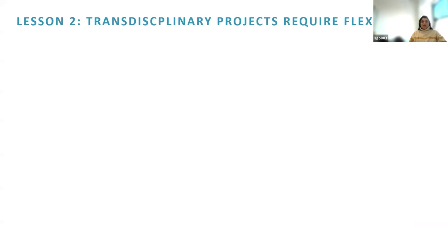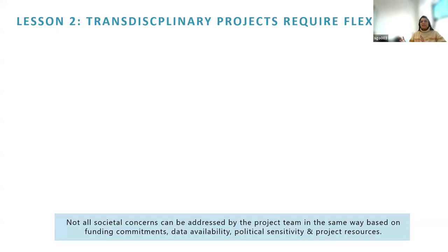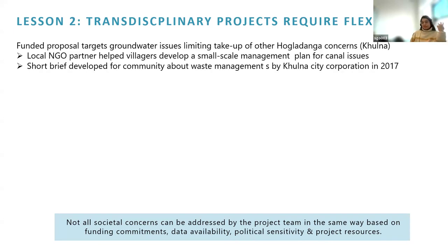The second lesson that I want to highlight here, based on my experience with transdisciplinary projects, is that it does require a lot of flexibility among the project team. Not all societal concerns can be addressed by the project team in the same way because of funding commitments or what our funders require us to focus on, but also data availability, political sensitivity, and project resources. For example, like I mentioned, there were three issues that were identified, but our proposal that we got funding for was focused on groundwater issues. So that limited the option for us to take up the other two issues, which were more surface water resource related, in a similar capacity.